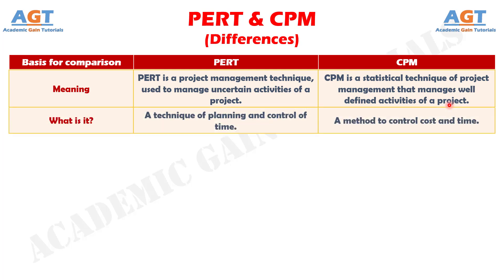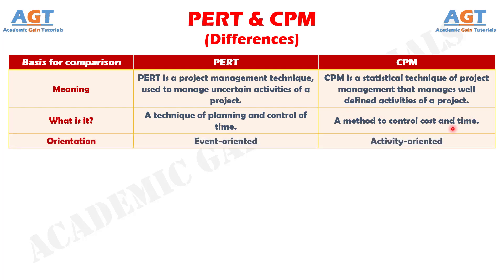Number 2: PERT is a technique of planning and control of time, unlike CPM, which is a method to control costs and time. Number 3: PERT is set according to events, while CPM is aligned towards activities.